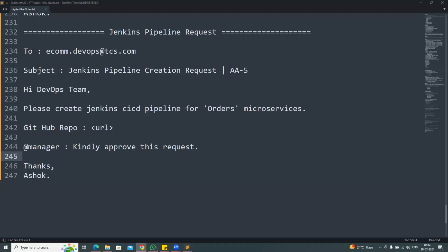And how can we generate a subtask? Yes, sir. Inside Jira, whenever you create one story, there will be an option called subtask also. In one story, we can create some subtasks. Suppose my story is taking 10 days of time. Instead of creating 10 stories, we'll create one main story, and in that, we will create some sub stories. A sub story is nothing but a small story belonging to one main story.